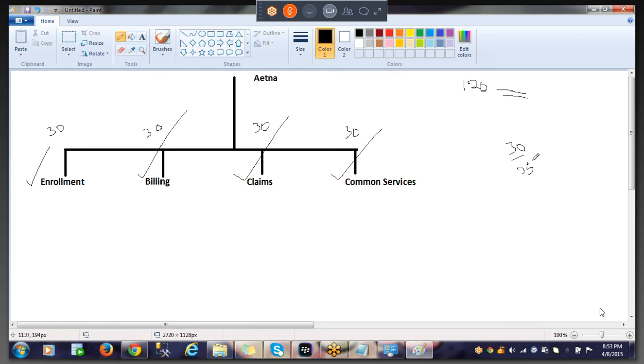Manpower increases, but it's the same you're going to pay. Apply the same thing for 120 days, you're reducing it to 30 days, right? See, the same manpower working for 120 days is equal to multiple manpower working for 30 days. Everything is the same. Okay, a slight difference, but everything would be the same.